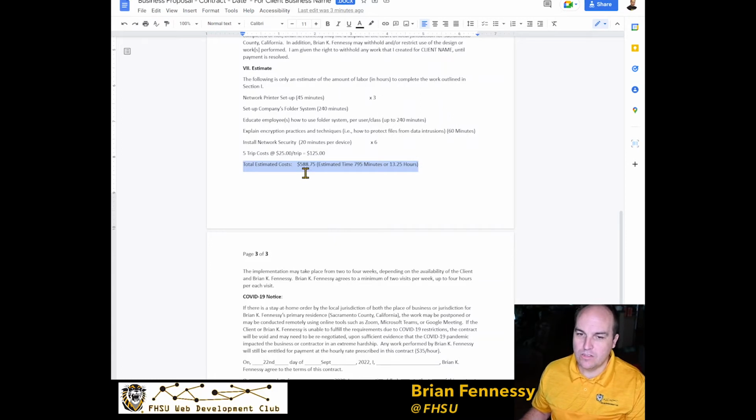That way there is no dispute, and you don't have to stop short of finishing what you agreed to fulfill, and then they only have to owe you the hourly. You could have made some additional if you just tell them, hey, I think this is going to take a few more hours than I anticipated. And the earlier you communicate those things, the easier it is to work out.